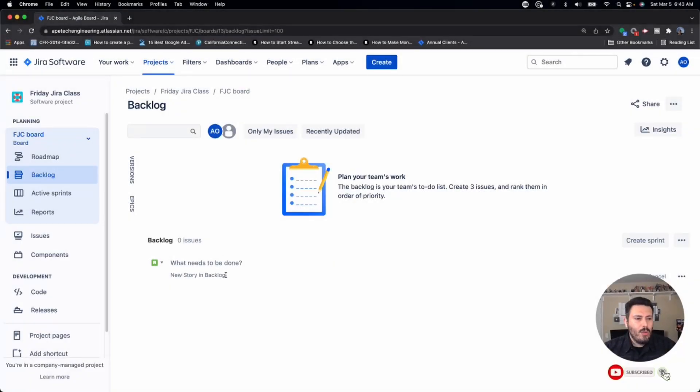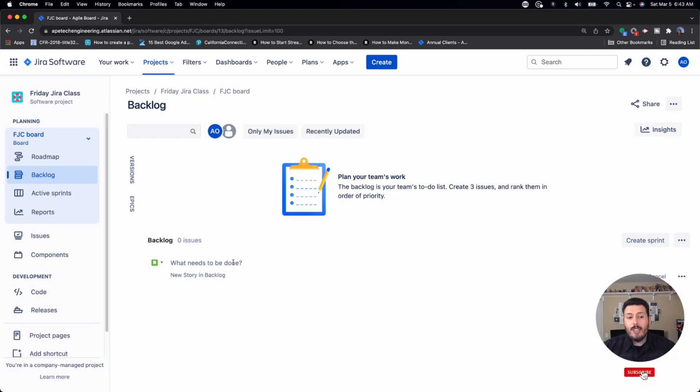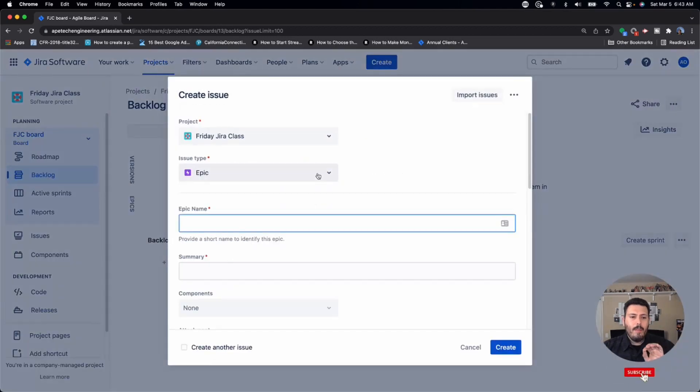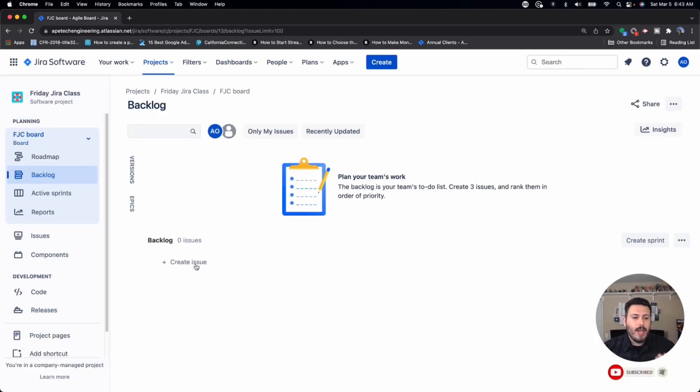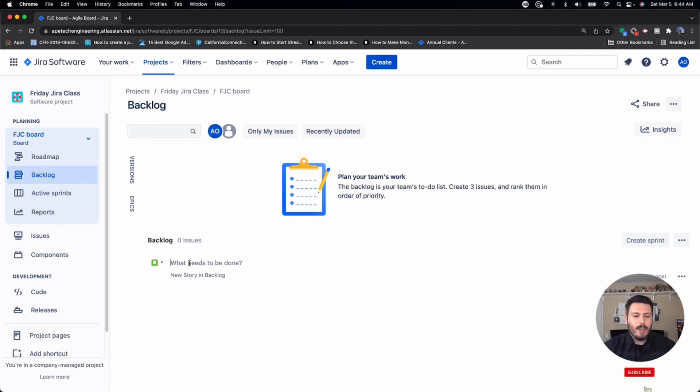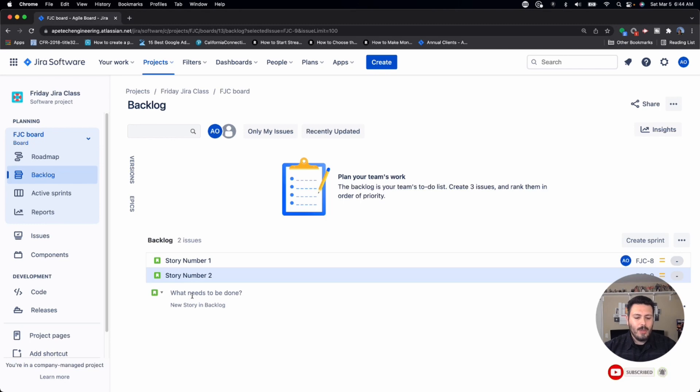Okay, so here we are in Jira. We are in a scrum board, and I'm currently in the backlog. You'll see that my backlog is completely empty, which is where you typically want to start. The good first step is to start creating the stories that your team is going to be working on. Now, there's a couple of different ways to create stories. You can either click the create button up here, bring up the modal, pick story. You could also just create an issue here using this inline entry. For the purposes of this demo, I'm just going to create a couple of issues here. This is going to be story number one, number two, and number three.